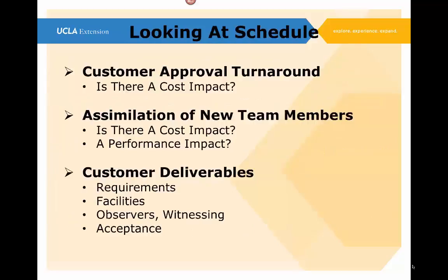What about customer approval turnaround? Is there cost impact? Oh boy, I don't think I've ever had a project where we're making reports or design documents or any kind of deliverable document, even a project report, change proposal. Somebody wants a change, and we got to go through getting through a change and a change package, changing the impact, the cost, and the schedule, and the customer takes a little bit longer than they commit to.